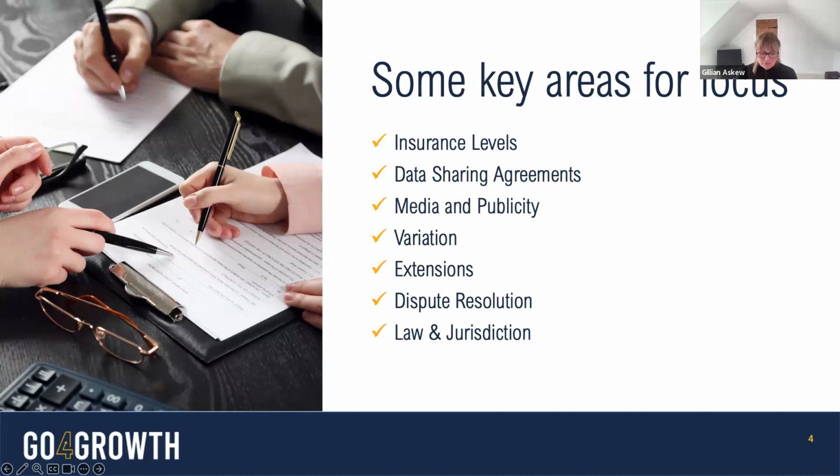In terms of variation of contracts, this speaks to how contract changes are made. It should be detailed in the contract. Any changes to specification, for example, might trigger pricing changes, and they can sometimes actually not be to your benefit, they could be to your detriment. And often in public sector, we'll talk about material changes and materiality. So a material change is something that's significant.